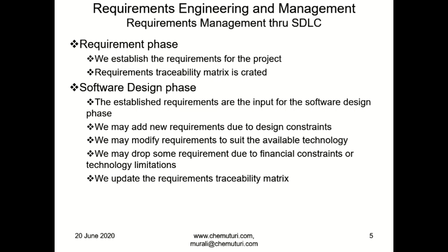And in the requirements phase, we also prepare a requirements traceability matrix, because through this we trace every requirement to its place in the product, in the construction and in the testing, the test cases which tested it, so that the requirement is delivered fully as asked for.